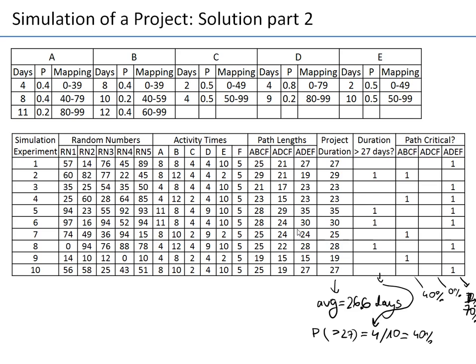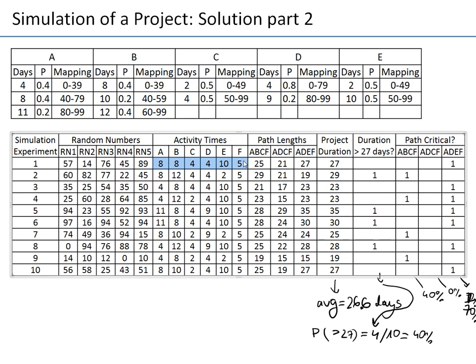In the previous episode I showed you how to simulate by hand a project. We simulated 10 experiments. In each experiment we simulated the project, the activity times and how long each path is. Then we computed project duration as maximum length of all paths, and determined if the project exceeds 27 days and which path is critical.